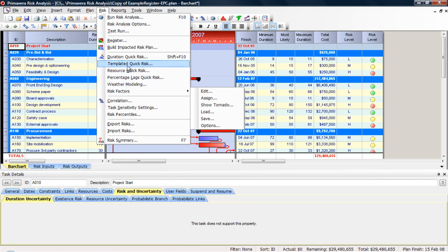So this is your uncertainty steps. When you look at uncertainty or productivity and things of that nature, when I'm looking at 3-point estimates, so I've got a 10-day activity, but it might be 10 to 15 days, that might be my uncertainty. So that's your 4th step in here.